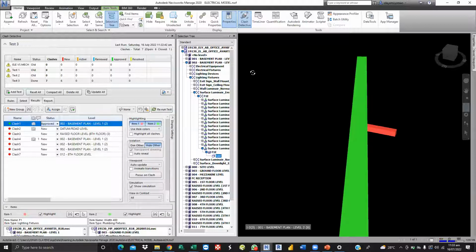We also looked at clash detection, and we understand that clash detection has about four types: hard, duplicate, soft or conservative, and clearance. We are able to understand how we can assign clashes to the different professionals responsible for taking care of them. And we looked at how we can export our clashes and see them in the web version, and everybody can easily go back and look.